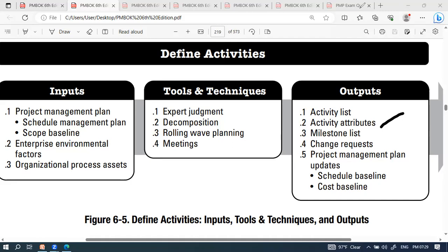Is there any schedule you're going to develop without the milestones? No. Okay, is the milestone mandatory? Milestone is a mandatory activity. Once you're developing the schedule, it's mandatory for you to develop the milestone. Milestone should be there. Milestones are mandatory for a major project. Without milestones, we cannot go for payment.